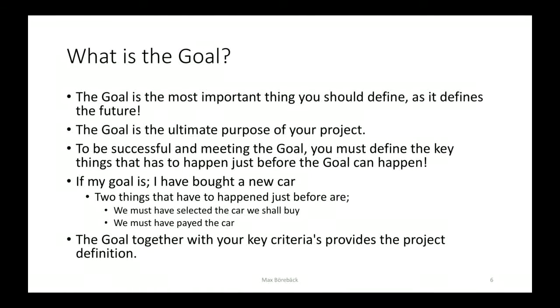So what is the goal? The goal is the most important thing you should define. It defines your future. That is where you're heading. So the goal is the ultimate purpose of your project. To be successful in meeting the goal, you must define the key things that have to happen just before the goal. Those are your critical success factors.